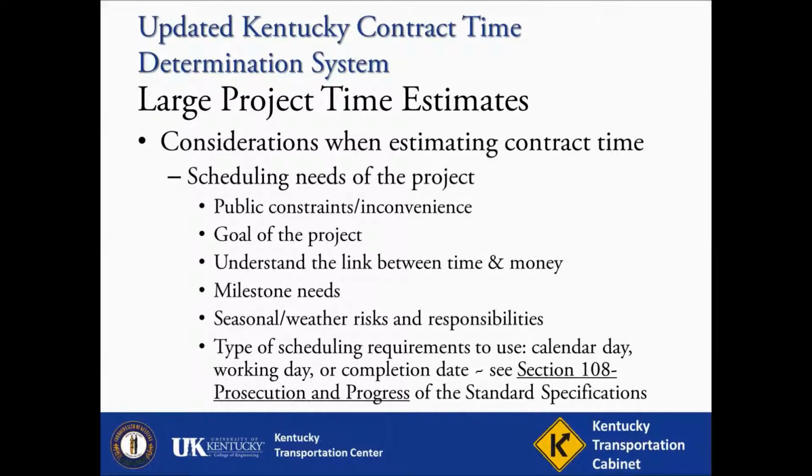Milestones are a scheduling tool that can be used to have different aspects of the project completed in times varying from the total project completion date. This is something that can be added to the contract and used with these contract time estimates as provided by the tools. However, these tools are not sophisticated enough to include them in the process of preparing a contract time estimate. Including milestones in the contract time will need to be done manually.